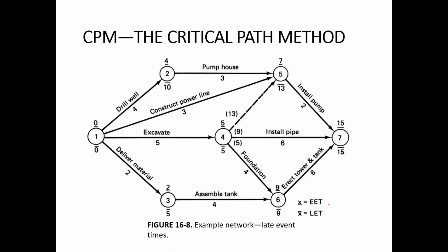Okay, so can you tell me in which process we calculated the earliest event time? Is it the forward pass or backward pass? Forward pass. Yes, in the forward pass, we calculated the earliest event times. In the backward pass, we calculated the latest event time.